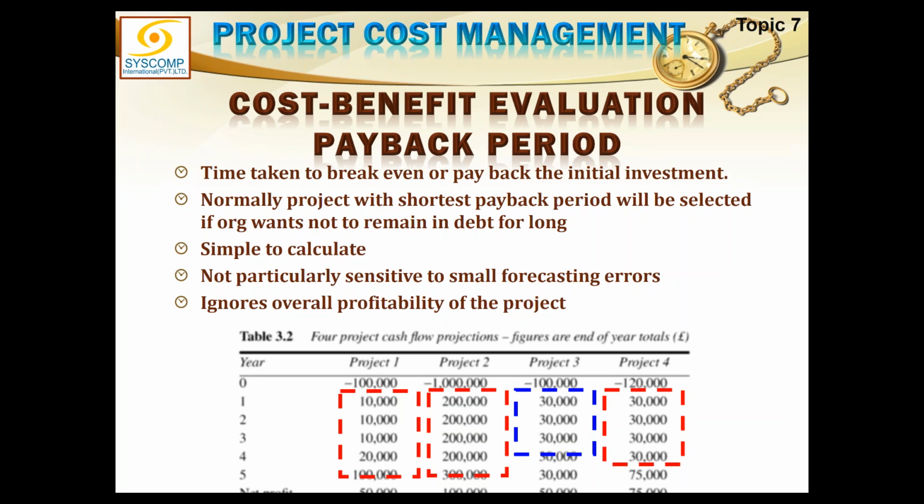If you look at project 2, 10 lakh rupees, 1 million, has to be recovered. 200, 200, 200, 200. In 4 years it is unable to completely recover all the money, and it is almost 4.6 years that it will recover all that money.